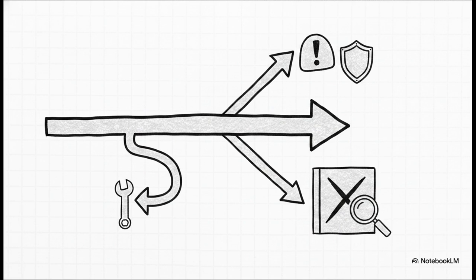When monitoring progress, managers encounter different decision branches. If everything is fine, great, keep going. If there are minor problems or slippages, which is completely normal, the manager simply updates and modifies the project schedule. However, if there are serious problems, it triggers a much heavier, more serious process. The manager must initiate formal risk mitigation actions and a total project replan. If those mitigation actions fail, a formal technical review has to be called to find an alternative approach. And in the absolute worst-case scenario, this review might even result in the project being canceled entirely. So to recap the workflow, identify constraints, schedule, execute, and always be prepared to replan iteratively when problems pop up.